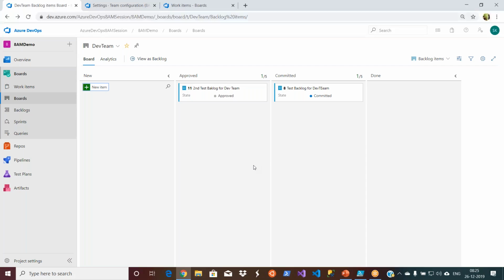Like what's the capacity of your team? How many members are working, and when they are working. So let us say I'm an architect, right? So I primarily do the architectures and designs, and probably sometimes I do some maintenance work as well based on the need. And if it is a developer or a lead, he may work 2 hours on the design activities, another 6 hours on the development activities.